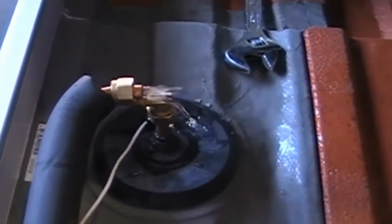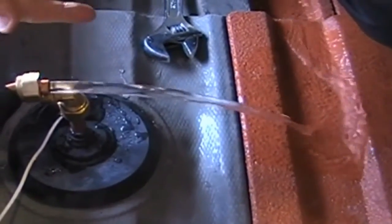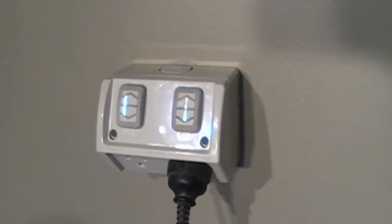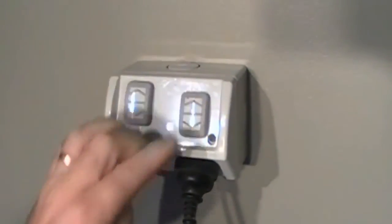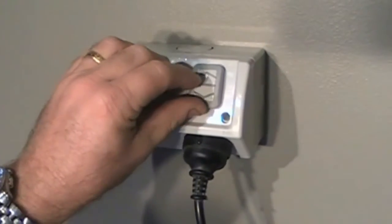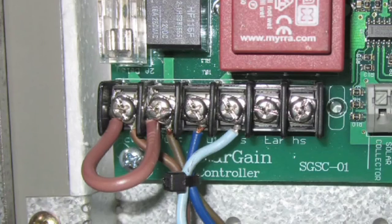One of the most important items when commissioning is to ensure complete solar circulation. Switch the power on, the pump runs for one minute. Confirm that the pump is running by switching on every minute and keep the pump operating. Or, a qualified person can bridge the two brown active wires together on the board to force the pump to run when the power point is turned on.